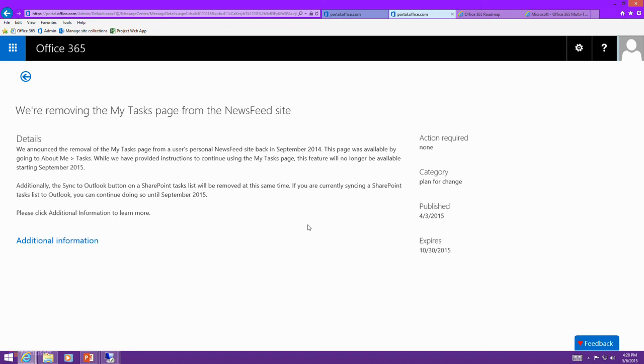But our current guidance, or my personal guidance there to get around that, is to create a service account, create a security category, deny everything in that security category, dump your closed projects into that security category. And that has the benefit that what you desire, which is it hides them all from the PWA views.